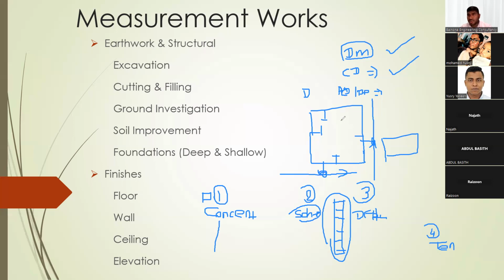So during this process, you have to get the approval from them. Otherwise, the contractor who takes the tender will suffer to price it. He doesn't know what's happening there. So that is another authority here.